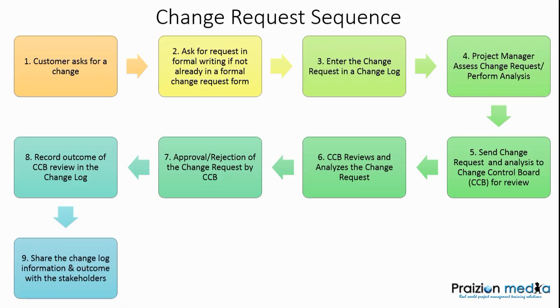Once the change log is updated, as you are in the stakeholder management processes, you want to think about sharing the change log, specifically in managed stakeholder engagement, because stakeholders want to be engaged by understanding changes that they asked for, changes that could impact them and affect their interest on the project. So share the change log information and the outcome of the change control board review with the other stakeholders.